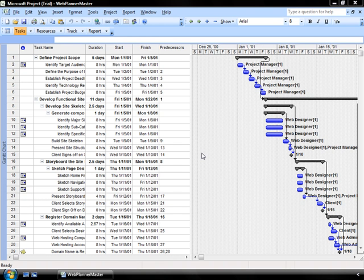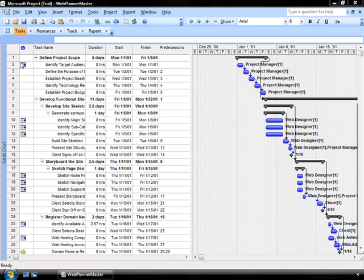A constraint affects the timing of the task in relation to either a specific date or the start or end date of your project, and those are identified by the icons in your icon column here. When you see this kind of a graphic in that column, you're identifying that there is a particular constraint within that specific task.